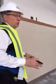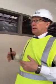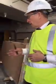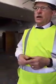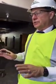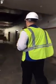We're happy to see this tile work being completed, and the high school wing is at a point now where they're going to begin doing the check off of the ceilings this week. Once that's completed, then we'll move forward with the installation of carpet. Our high school wing is carpeted, and obviously our science rooms will have VTC vinyl flooring in them, so just regular vinyl flooring in those.